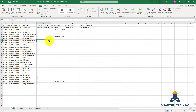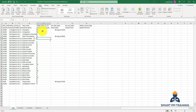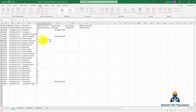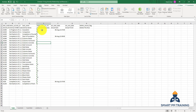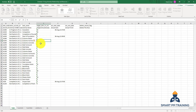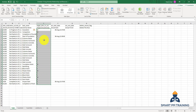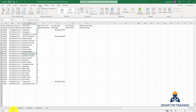As a shortcut, the only difference needed is text format — all numerical values must be in text format so Primavera can recognize them. Another option is to type the apostrophe symbol before the number from your keyboard, then press Enter — it becomes text. However, when working with large amounts of data, you cannot do this one by one. Instead, highlight the whole column or certain activities, go to Data > Text to Columns, and follow the same process.